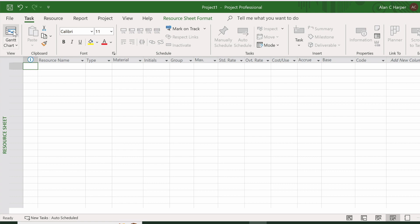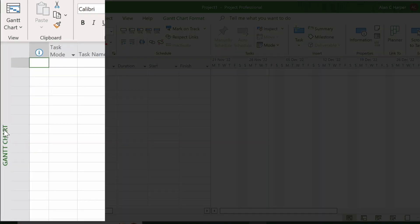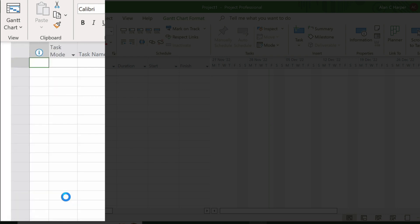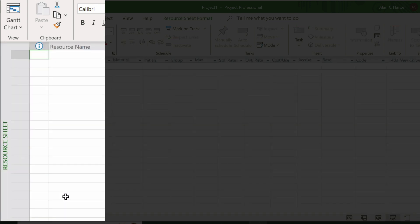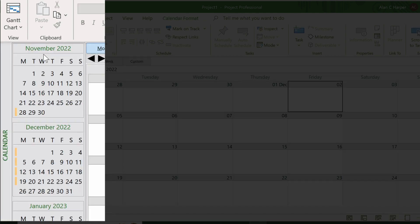If I want to go back to Gantt chart I click on Gantt chart, but did you know that if you right-click on the view name here, you get a submenu of the typical views you might want to use? Right away there's my resource sheet — I haven't had to go up to my task tab, view group, or Gantt chart dropdown. And if I want to go to calendar, I can right-click again, go up to calendar, and it changes to calendar.